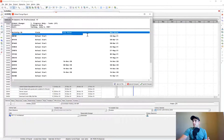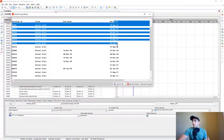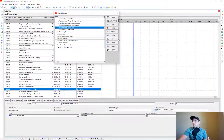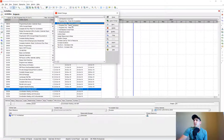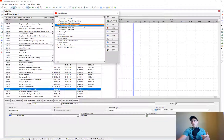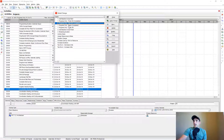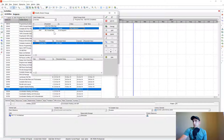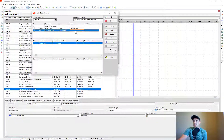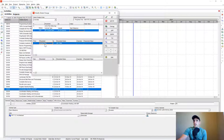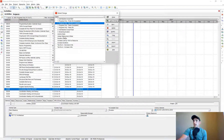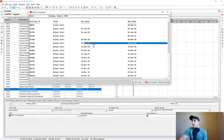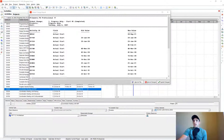Let's apply those changes. You can see those instances where items are in progress in my update file — it's going to add those values. Let's commit those changes. The other thing I want to account for is milestones, since we filtered specifically for task-dependent items. Let's get our start milestones done — these are activities that are start milestones where the BL1 actual start is not equal to blank, and for those we make the actual start date equal to the BL1 start date. Most already had actual start dates, but a few are getting filled in. Let's commit those changes.